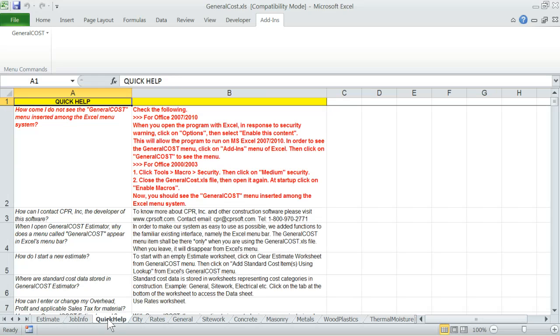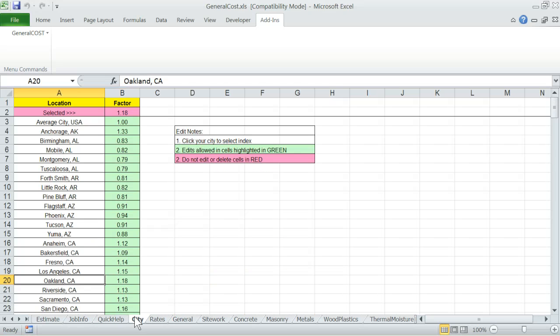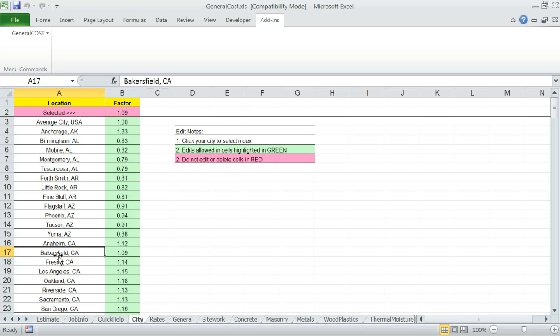Quick Help contains some basic help information at your fingertips. City. This worksheet contains several cities with associated material cost index for each. Simply click on your city or closest to your city and the program will remember and adjust material cost based on its index as the estimate cost items are added to the estimate worksheet.